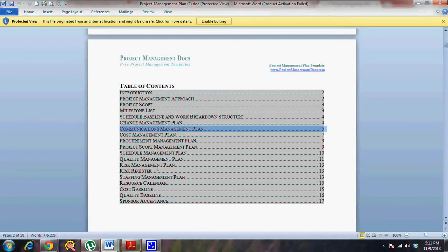Because the issue log is treated as a project document, which means that it will be a separate living document so that you can circulate it within the organization, while the PM plan is a separate document which links to other project management plans and the baselines. So with that background, the PM plan would have these subsidiary plans or the knowledge area plans and also the baselines as the most important contents within.